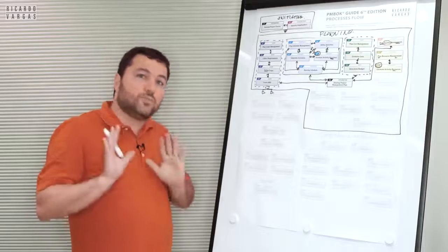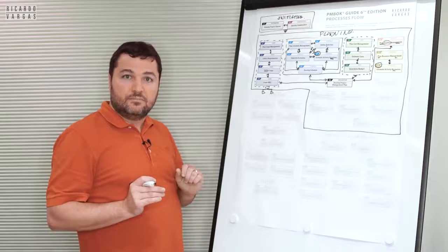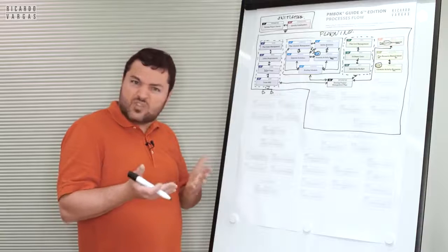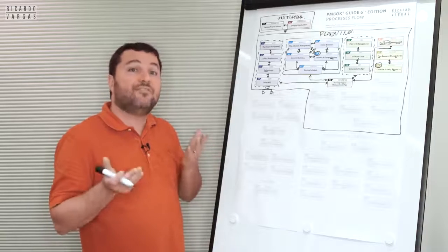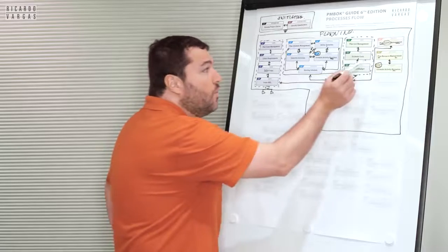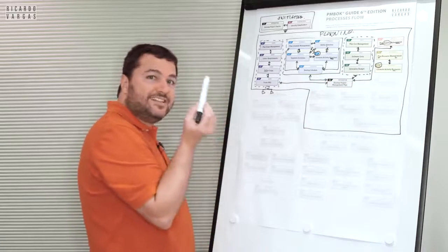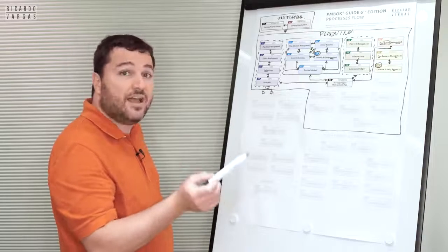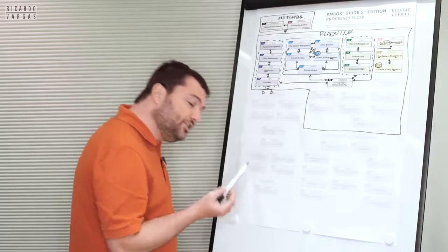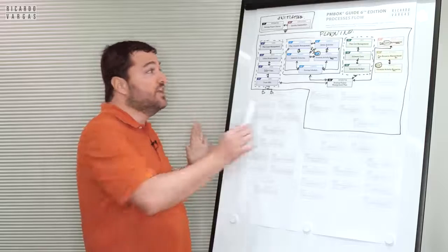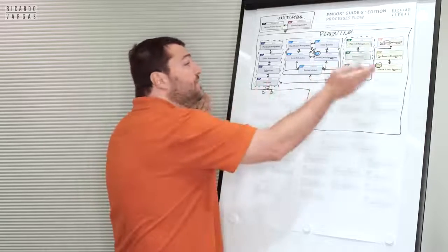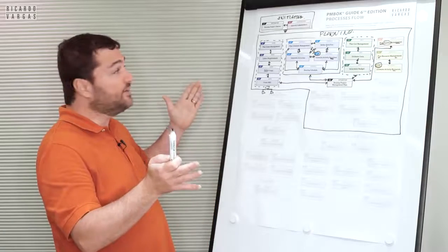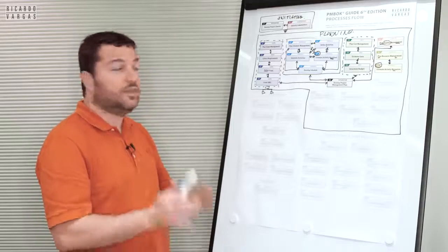Let me give you a very super simple example. Let's take this wall. Say one worker can build this wall in 10 days. It's reasonable to say that 2 workers can build it in 5 days. So this is exactly what I'm talking about here. Because most of the tasks, I'm not saying all, are effort-driven. When I say effort-driven, I'm saying if you add more resources, you reduce the time up to a certain level. So this is why it used to be together. Now it's in 2 different areas. Does it mean that you will need to do it separately? No, never. Think about that.